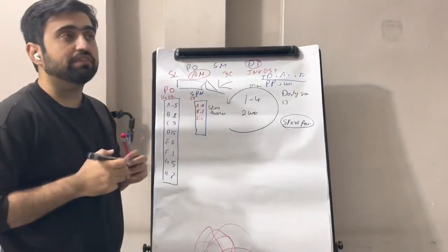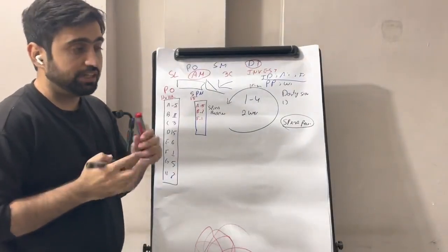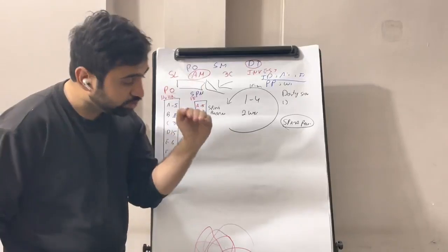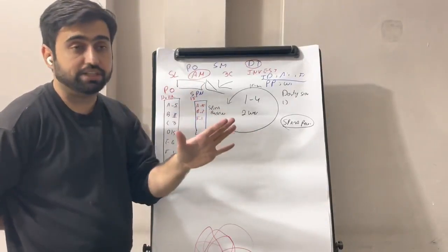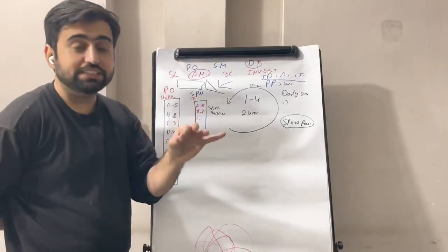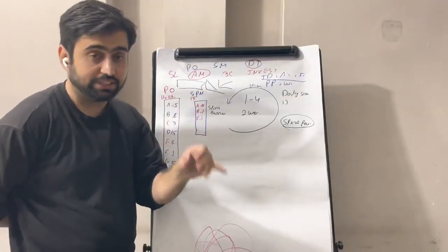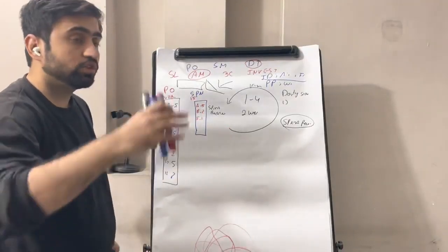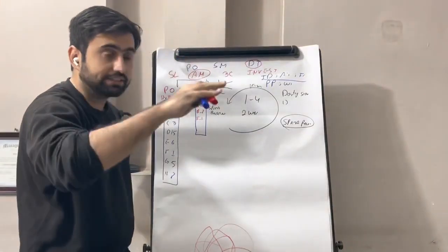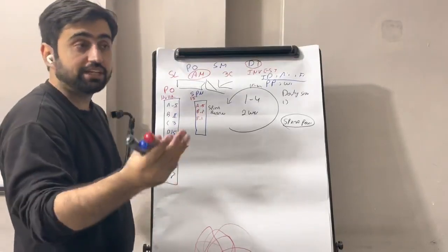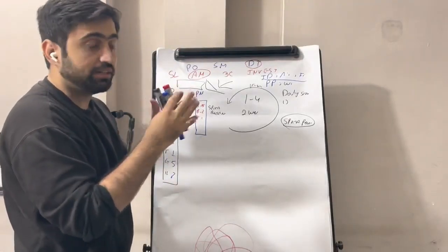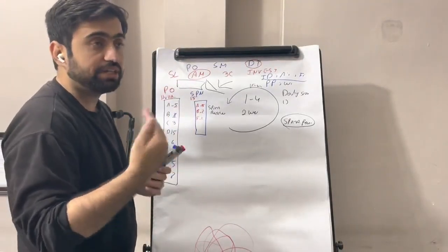Once the sprint is completed, we go into the sprint review, where we show them what we have done. We have a definition of done, a checklist that we use to see which user stories have been completed. A user story has to be completed 100%, otherwise it is not accepted. Agile does not consider 99%, it considers 100%. So we go through the definition of done and check all the things are there. Then the customer has their acceptance criteria, again their checklist. Once they match that and the product is accepted, it goes into release.